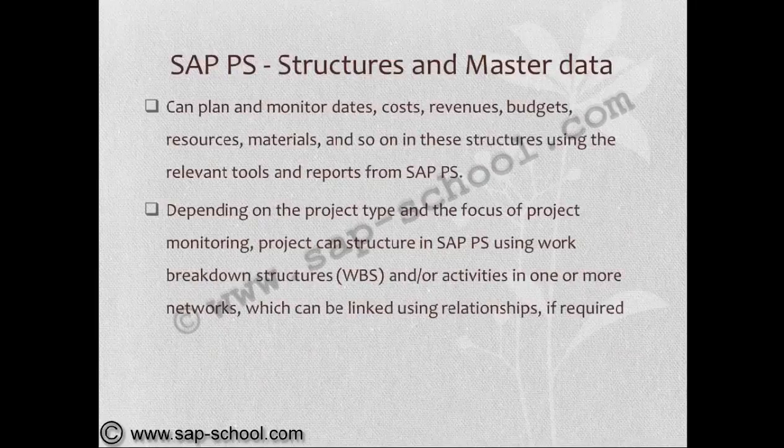We can plan and monitor dates, costs, revenues, budgets, resources, materials, and so on in the structures using the relevant tools and reports. Depending on the project type and the focus of project monitoring, a project can be structured in SAP PS using work breakdown structures and activities in one or more networks which can be linked using relationships if required. So the structures and master data involve work breakdown structures and network structures.